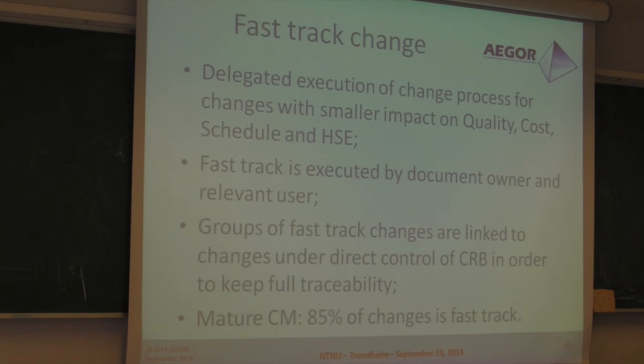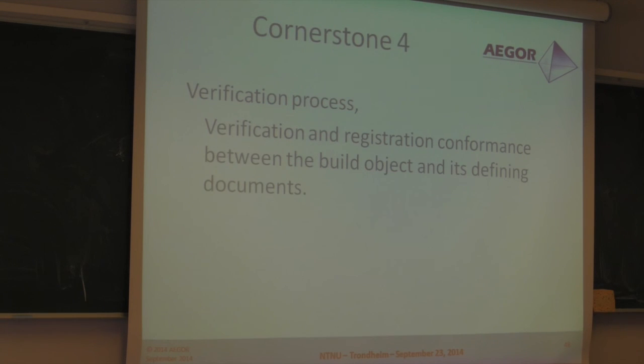Fast actions, already said. That's when you have small changes not impacting cost or schedule or so much. And if you have a mature implementation of configuration management, 85% goes along the fast track, and only 15% goes through the board. But it's the same look, the same process. So a big advantage is also that you have the right priorities in your schedule. If there are any questions, you know where to find me. Don't hesitate if you have some questions.